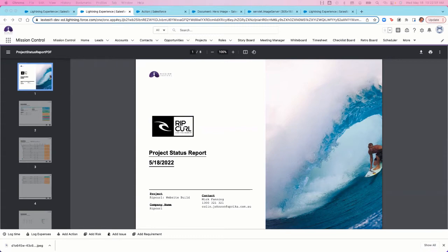So the higher the score, the better you're performing. So that means you're delivering the work more efficiently than you scheduled it to be delivered. So this will take into account the earned value and the actual cost on your project. So that'll be like the earned value divided by the actual cost will result in your cost performance index.